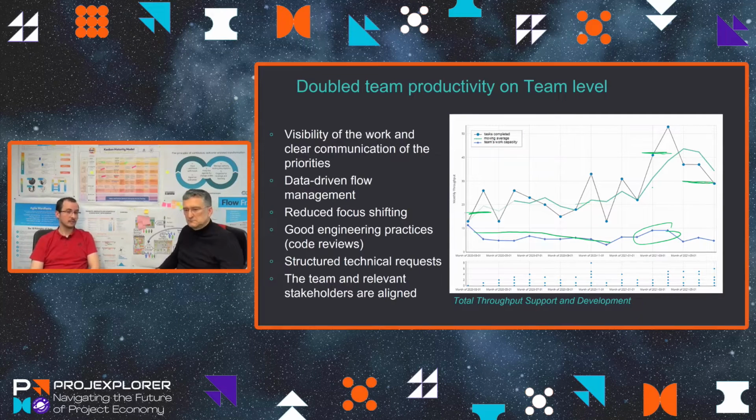And we saw that after we started with the WIP limit, so work in progress limit of 3 tasks per person. Now, with time, we saw that 3 is too much. We actually tend to be way more productive with only 2 tasks. And I believe that if we have 1, we will be even more productive. But unfortunately, business requires for us to be working on more than 1 task at a time. Yeah, but two tasks in parallel is a dream for some IT specialists in some environment.